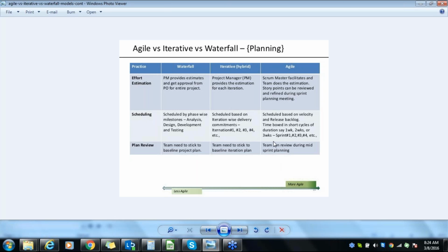But in Agile, I already broke it into 3 and 4 days. So 3 days for the initial username and password, 3 days for the forgot password link, and 4 days for sign up. Once I have completed the forgot password piece of code development, I can jump into the sign up page. So you can always revisit the plan that you have created. Nothing will stop you here, because it's already broken into pieces. You can move into the next phase. So that's the advantage of having Agile.